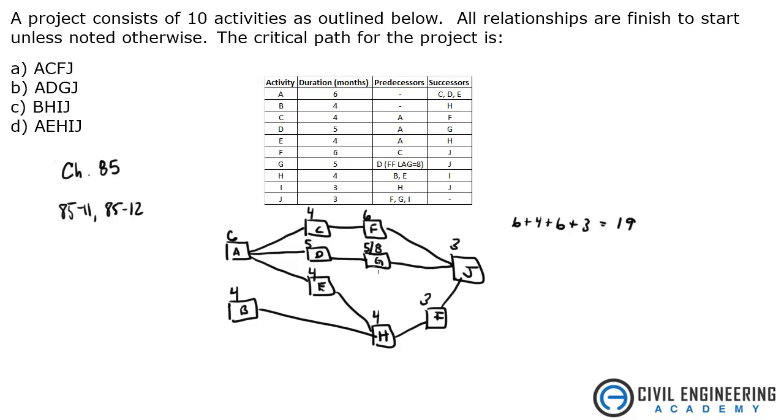How about A, D, G, J, which is A, D, G, J. That's six, plus five, plus eight, plus three. So that's 11, 19, 22.